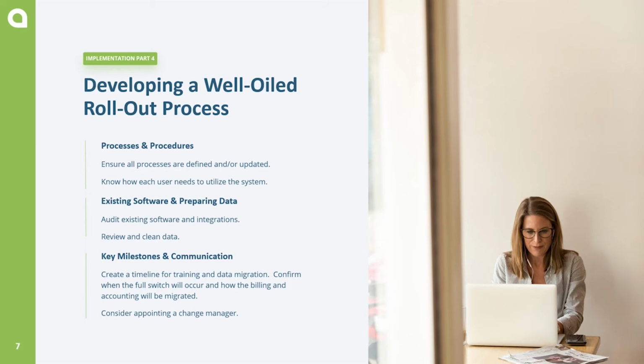Review your data migration plan and consider if your data needs cleansing prior to migration. Data may be duplicate, outdated, contain application and system data files, or stored in locations that have not been accounted for in your migration plan. Not only will this ensure that all your data gets into Actionstep correctly, but it can eliminate problems during the migration process that can cause delays. It is much easier to clean up your data before it's imported into Actionstep.